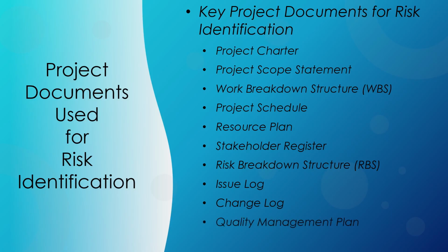The quality management plan outlines the project's quality standards, quality assurance processes, and quality control measures. It provides insights into the project's quality requirements. By reviewing the quality management plan, project managers can identify risks related to quality issues, non-compliance, or quality-related rework.